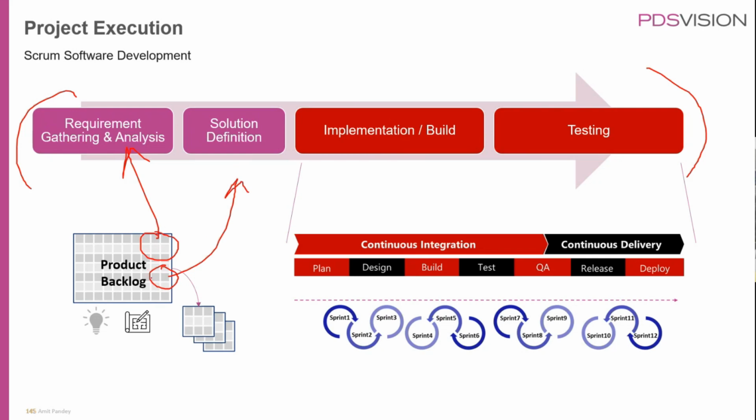Now since it's waterfall, ideally speaking, I should not be picking from the product catalog and assigning like this. But just for the demo purpose, when you do this, what you do is that you have the requirements, you convert them, you create user stories for these requirements, or in some cases you directly assign requirements, but you also create user stories, and then for user stories you create tasks, and you assign tasks and the user stories to sprints, and the task is also assigned to people who have to do the job. So this is what we'll try to understand and demonstrate so that when you are doing it in a practical way, you will know what you're doing here.